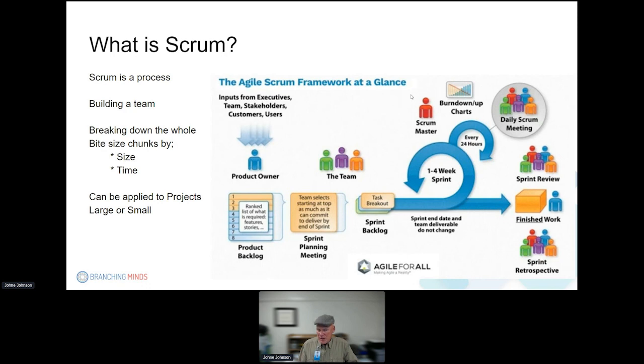They're going to get things done. But there's going to be some guy in my group called a Scrum Master who is basically the person that's going to ask 3 questions. He's going to ask, what did you do last week? What are you doing this week? And what can I help you with? And those are where your daily Scrum meetings come in. Depending on the time frame you set, it depends on which project we're doing. Some projects we do weekly, some projects we do daily. And every time we have that meeting, those are the questions the Scrum Master is asking.